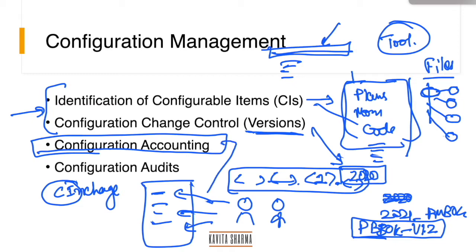So he would create directories and give access to people. So this falls under configuration accounting. Whenever somebody asks for a particular access on a particular directory, there might be an approval process. This guy asks the approver, which could be project manager or somebody, and allocates the right access to these people.